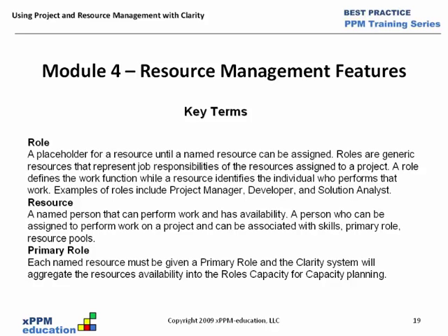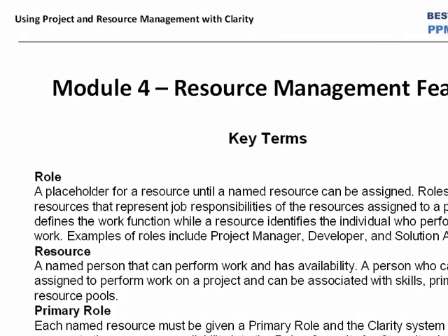So that's our objective, is that we want to begin the initial planning on a project and develop the project plan with a placeholder, a role. And then once we know what the requirements are in terms of demand, start, finish amounts for that role, then that demand amount can be communicated with the resource manager, and a resource can be found to replace the role.